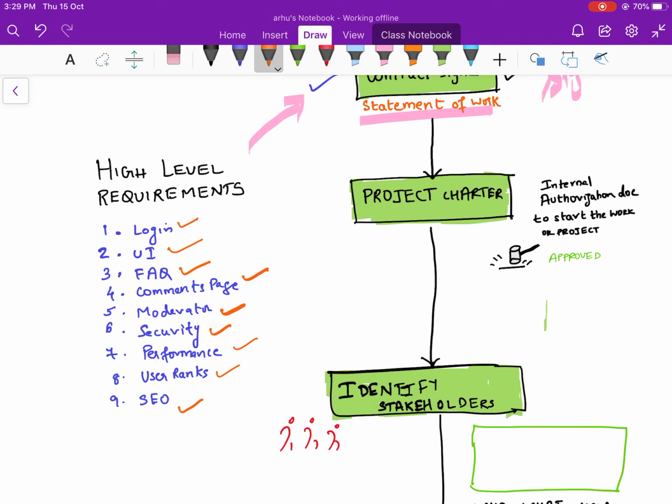Once you have the project scope statement, your next job is to create the WBS, the work breakdown structure. You might have heard a lot about this, right? It is a hierarchical, graphical representation of the hierarchy of the project. Things to remember: you will have the deliverables, that is, development and testing. These are tagged to the control account. A control account will have a budget associated with it, a schedule associated with it, and a deliverable.